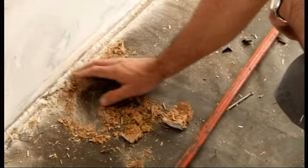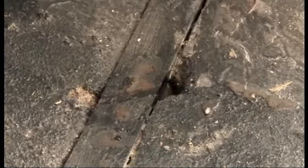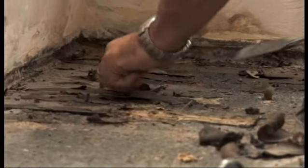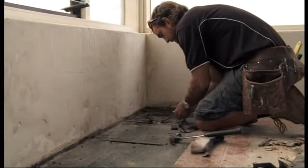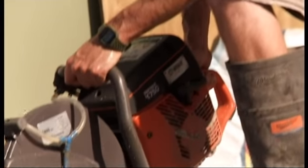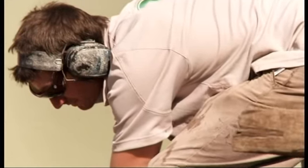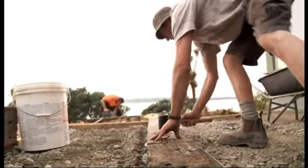Back to the downstairs bedroom, and time to front up to the water damage problem. It turns out it's not as bad as first thought. There's been water damage here for sure, but the problem seems to have been related to the ground level being higher than floor level outside. Pascal and his team's recent concrete cutting and lowering of the ground level to create a barbecue area outside this room has had the unexpected benefit of fixing what was causing the water damage problem inside this room.